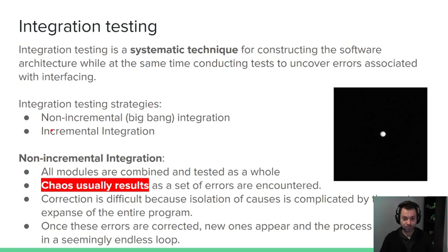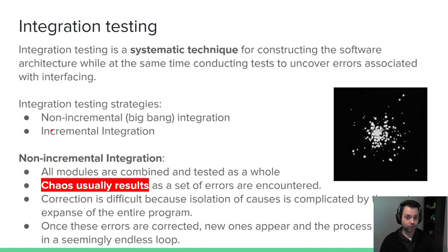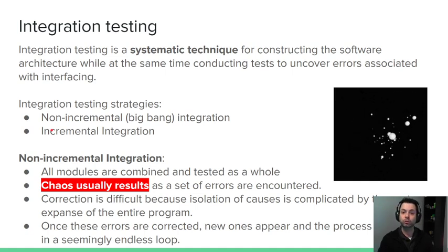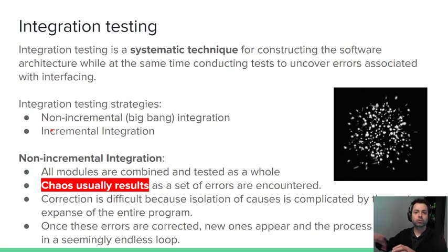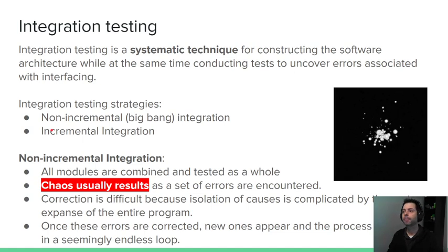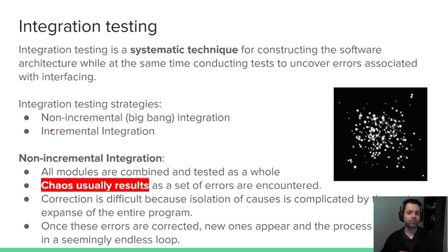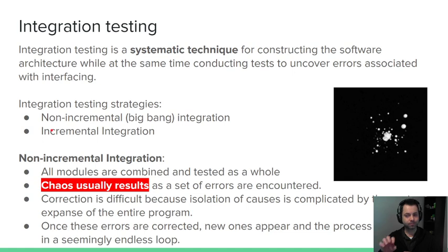If I test systematically and incrementally, like I've got my module and I bring in, say, your module, then I test it. Does it still work? Yes. Then we bring in another person's module, test again. Then another module, test again. It might take a little bit more time, right? Because you're doing them somewhat piecemeal, but you can account for all of the oddities that happen in a very fine-grained manner.